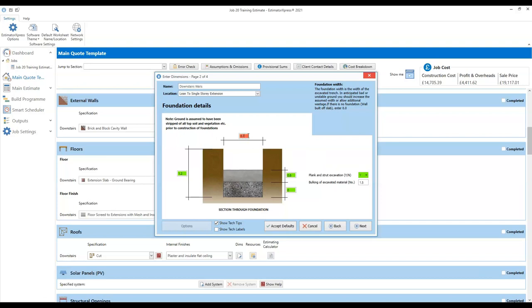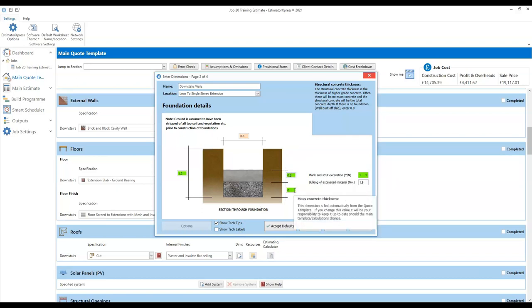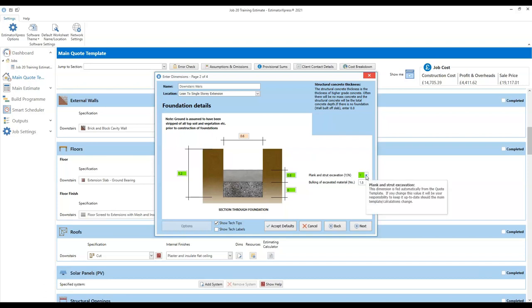If you make a change to the foundation width, it will turn red — that's just flagging up the fact that you are deviating from what you've got in your standard settings. Then we've got an input for the thickness of structural concrete, and an opportunity to put a thickness of mass concrete if you're doing particularly deep excavations and need to use a cheaper mass concrete as well as your structural concrete. That option is set to zero as standard because a lot of the time you will not need to. There's also an option to plank and strut your excavation — because it's deeper than a metre, it's setting that to yes.